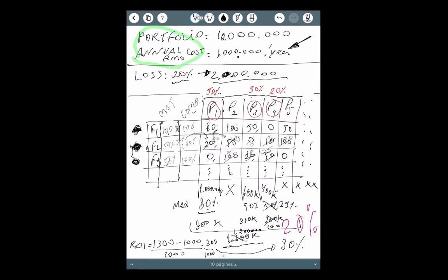Of course, your loss in absolute numbers will be small too. And if you have only one person, for example, at your PMO, probably it will be more expensive than the potential of recovery of your PMO. Okay, so this model can help you to understand if a PMO makes sense for you or not.